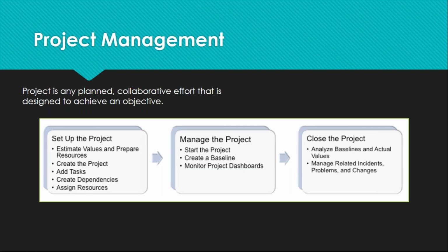Initially, when you create a project, it's in draft, and you have to fill in all the information that is required in the planning phase, where you're estimating the requirements and the business use. I'll show you all the details in the project form. Then manage the project: start the project, create a baseline, monitor project dashboards. Then finally close the project, analyze baselines and actual values, and manage related incidents, problems and changes.